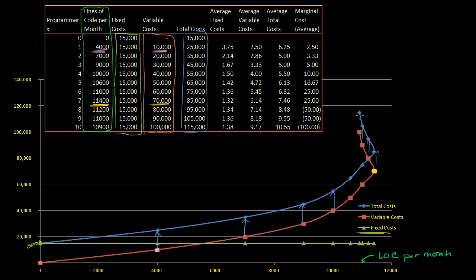You'll notice the curve bends back on itself, and that goes straight to what we talked about in the last video. As we add more and more programmers, the average productivity per programmer goes down because they have to start meeting and coordinating with each other, and maybe they undo each other's work. There's some point at which even when you add more resources, it actually decreases productivity. We get to a point where we're able to generate 11,400 lines of code per month, but then as we add more developers it still adds cost — we have to pay their salaries and insurance — but our total productivity starts going down again. That's what we see when both the variable cost curve and total cost curve start curving back on themselves.